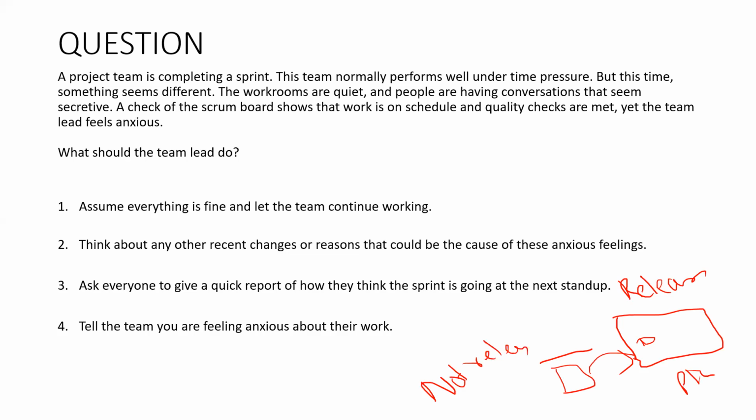Okay. We put them separately, and separately means we will have a Kanban board, right? If it is a flow type, then Kanban. Otherwise, we can put it in the product backlog and the product owner reprioritizes this product backlog. It could be a Kanban board, an Agile board, a task board, or a sprint board. It could be any type of board.